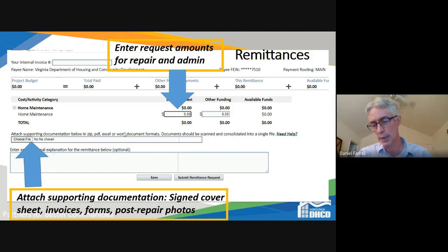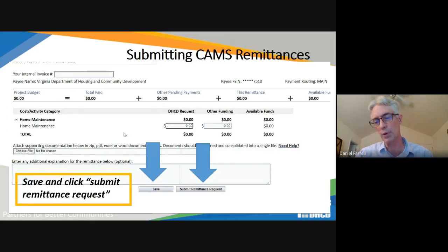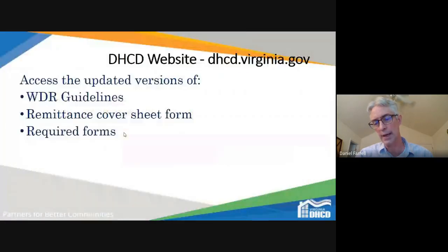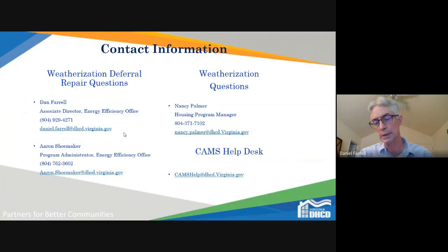And then this segues into a couple other questions Leroy asked. Can you use budgeted funds for other homes? We're basing these budgets loosely off the list of deferred homes that you all provided to us, and estimates for the costs. That's basically how we framed the budget that you have available. So if you have other homes that come on the deferral list and you want to use the funds for those, yes, you can use these funds for those projects.